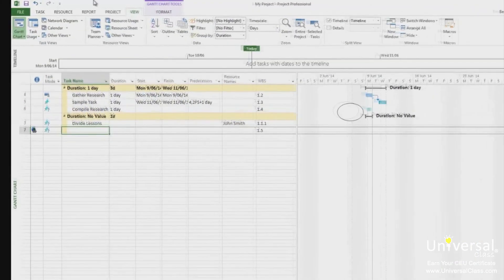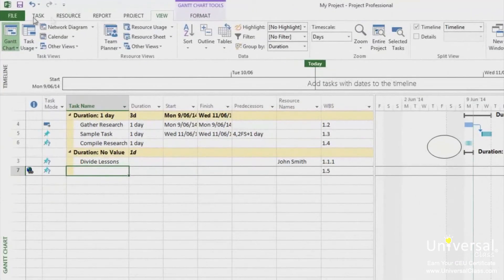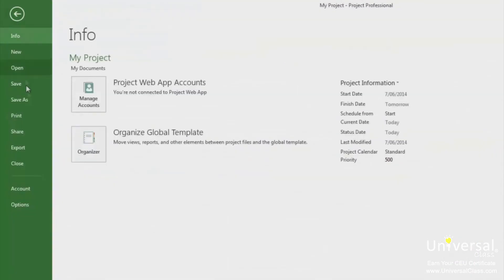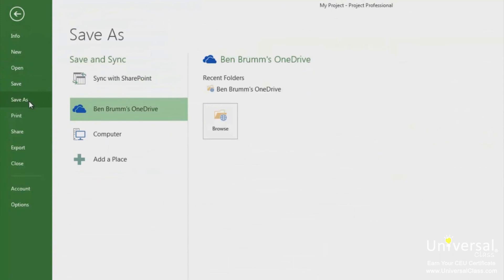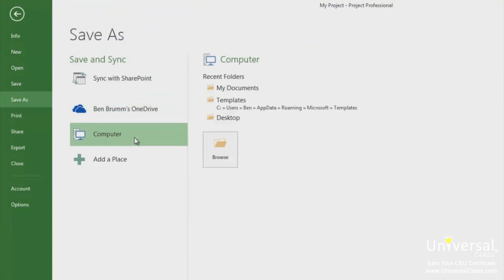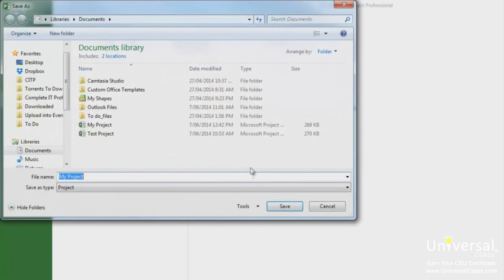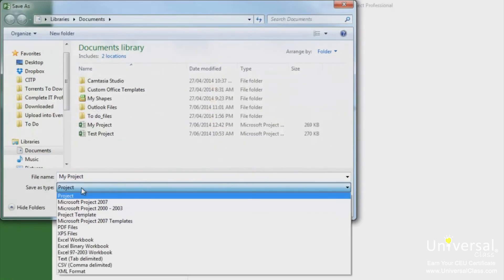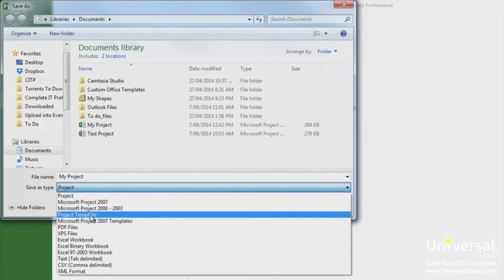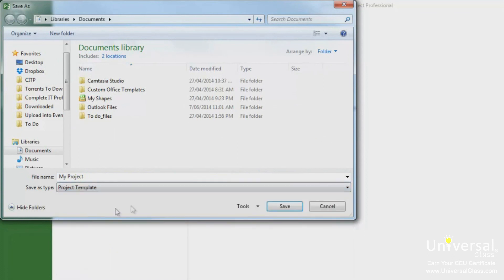Open the folder you want to save and then go to file and then save as. Microsoft saves templates in a folder called templates. Choose a location and then in the save as type, change it to project template. Click the save button.